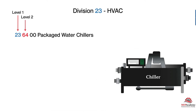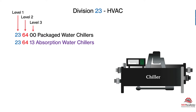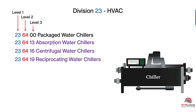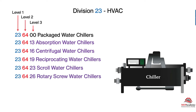Level 2 — the second set of numbers — is 64, and that's where you'll find Packaged Water Chillers. But we all know there's more than one type of Packaged Water Chiller, so that's where Level 3 comes in to define the type. In this case: Absorption, Centrifugal, Reciprocating, Scroll, and Rotary Screw. So Level 1 is your Division — HVAC. Level 2 is Packaged Water Chillers. And Level 3 is more definitive because there's more than one type.